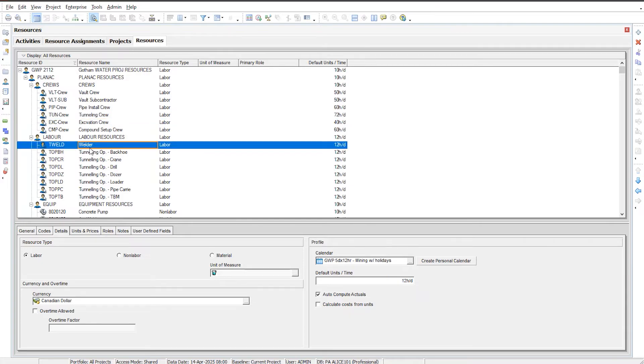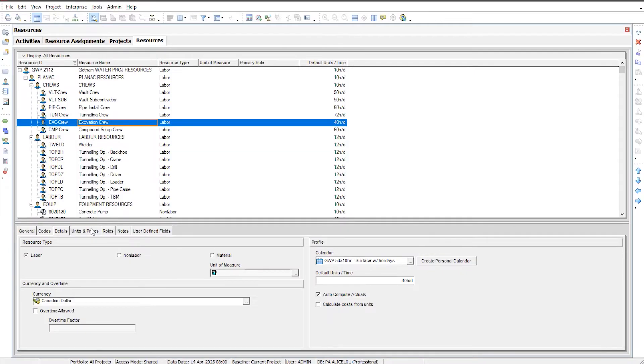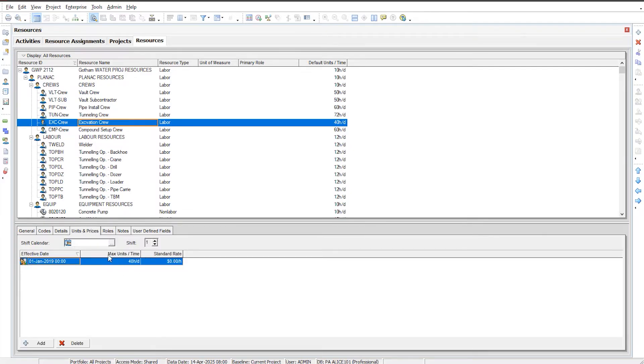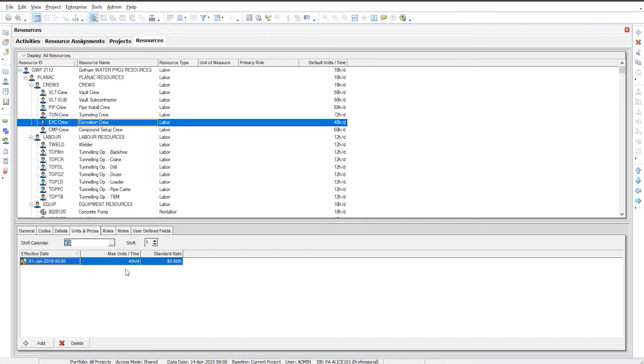Look how I've done it here: I've got my excavation crew, my tunneling crew. Down here I also have 'welder' — I don't want 'welder,' I want 'welding crew.' Set up excavation crew like this. This is important especially when we get to units and prices, because there's a field called max units per time, which indicates how many resources you have. This is your productive capability, usually in hours per day. If I have 40 hours per day for an excavation crew, it means I have one crew. That crew can execute 40 hours in a day. If I have multiple crews, I'll increase that number. Don't set up individuals, because you don't want max units per time to be a huge number representing all the different people you have. Keep it simple.